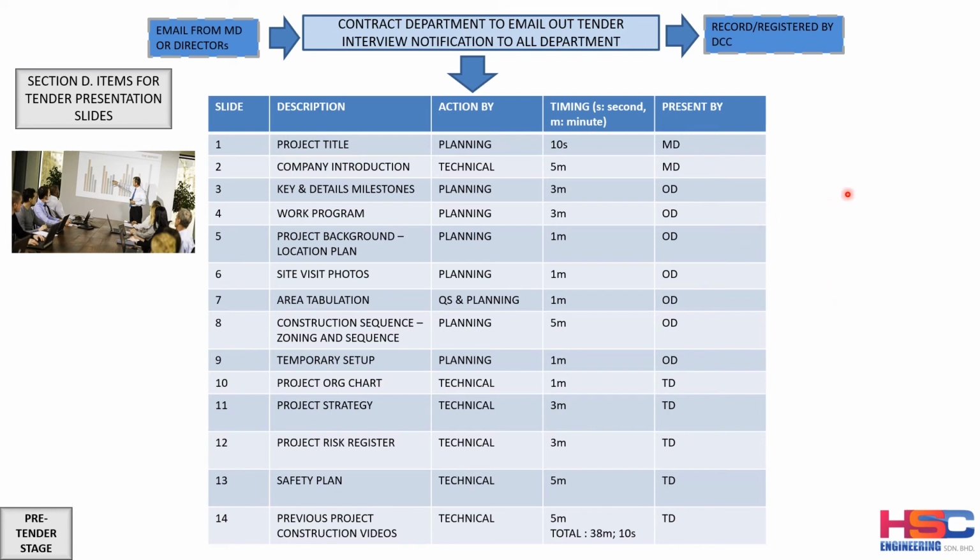So during the tender interview, many times the client will ask for a tender presentation. So these are the items that we want to discuss here that can be prepared for the tender presentation slides. Okay, once the email is received from the MD or the directors on the tender interview, the contract department will email out the tender interview to all the related departments, and this will be recorded by the document controller.